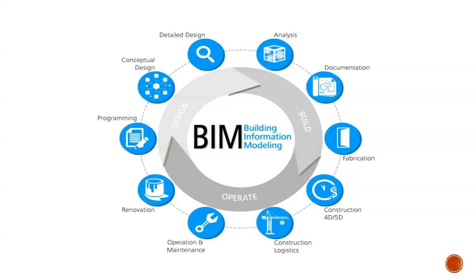What's the benefit of that? When I'm creating my construction documentation to build on the site, I'll be getting fewer errors. So we will be putting more time into the design stage, so that I'll be creating a zero error model, and from that zero error model, I'll be going for the documentation part. In turn, we will have less rework, we will have less delay. Like that, we'll be getting some more efficiency gain.